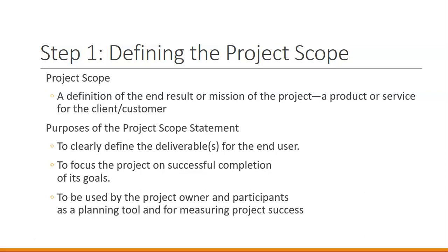So, for example, in many road construction projects, when you're working with the government, you bid the project to be done at a very specific price. And regardless of whether or not you are able to work within the price, that is the amount of money you're getting for the project. So you need to be very clear in what that project entails, because if you go over budget, that doesn't necessarily mean that you're going to get paid by the customer for going over budget.